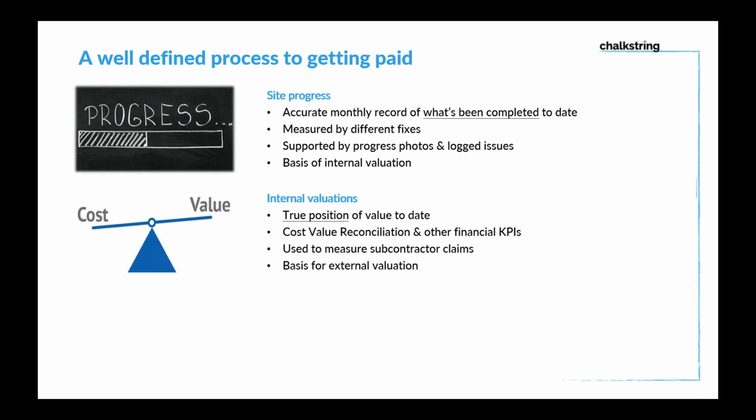Then on the internal valuation side of things, this is very much your true position of where you stand as a business, as a contractor, at that point in time, looking at your cost and your value. So we're into cost value reconciliations, or CVRs, and other key performance indicators and measures, things like your cost to completes and projected margins. But ultimately, this is your internal true position of the business, and it's very much about your current standing at that point. Therefore, it's used to do things like measure your subcontractor claims.